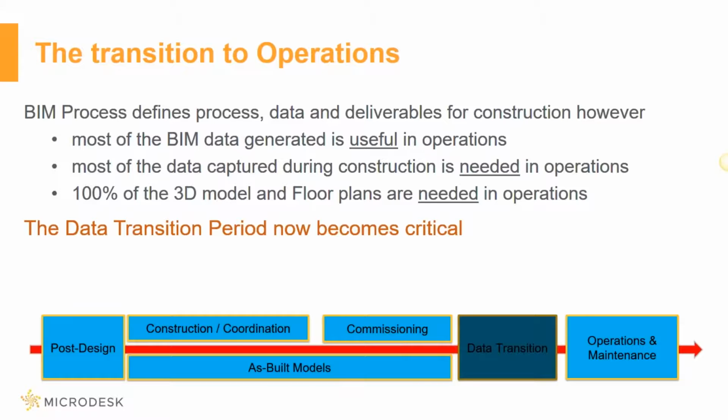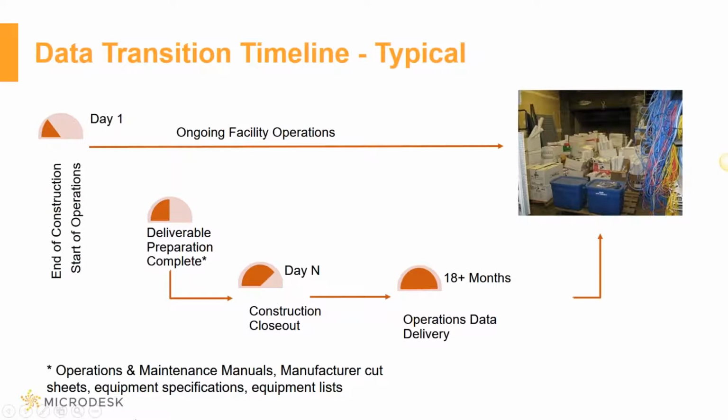We have, on day one, the end of construction, which also corresponds with the start of operations. So at the end of major construction, our operations group is going to start to take over the facility and start to perform maintenance and checking on equipment, answering calls, looking at heating issues, looking at how the facility is performing. But all the while, the deliverable is being prepared by the general contractor.